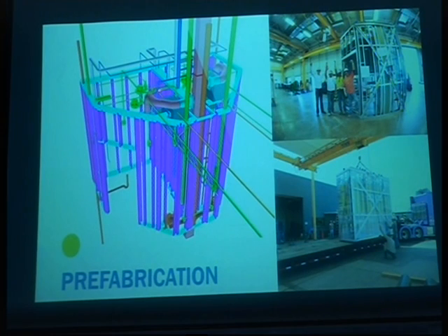And so this is, again, a double bathroom in a hospital, basically two patient rooms adjoining. We're able to prefabricate these bathrooms in Phoenix and ship them to the Bay Area in San Francisco. This is a hospital in California. And the reason we built them in Phoenix, Arizona, is that it's a non-union state.